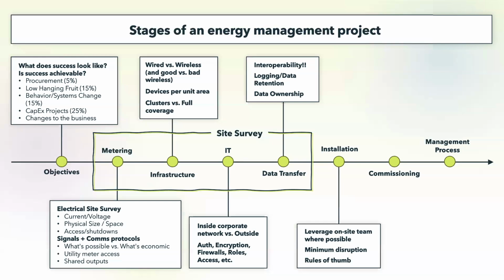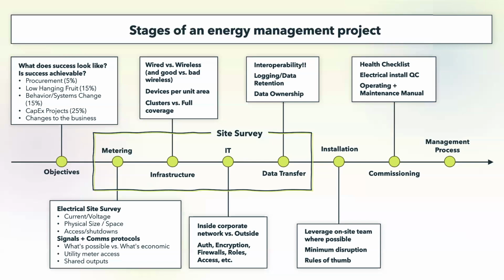Then we get to installation, right? And here we want to keep the disruptions to the minimum, so we do this as smoothly as possible. We want to leverage using our on-site team as much as we can, but sometimes we know we will need to engage with external contractors, including software developers. Then there is commissioning, validating that data, creating that operations and maintenance manual for the system so that it keeps delivering year after year, right?